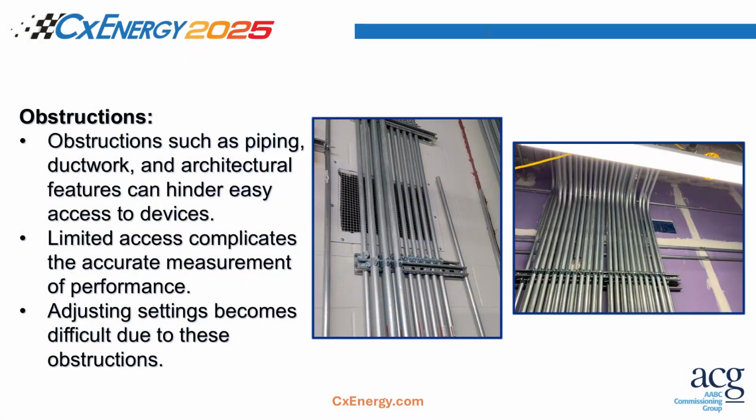And then obstructions with visual arts, the main ones that we saw was a lot of electrical just covering up the diffusers. But there's always the architectural features where, as I said on that one slide, I would prefer not to have those slats in, because we can't put the hood on them. Once they start putting in all those architectural features, there's a different means and methods that we have to go through. And the easiest process is just holding up a trade real quick to try to get those accurate readings before we did it.